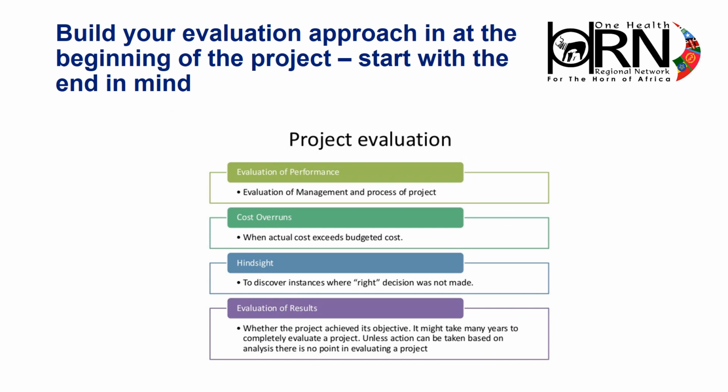Although evaluation is usually one of the concluding activities, it is essential that the evaluation design is determined at the outset by asking such questions as: how will we know the project has been successful? What specific criteria and associated metrics will be used? How will we collect the data? How will we assess the way the project is managed to enable us to learn from the experience and adapt our approach for future projects?